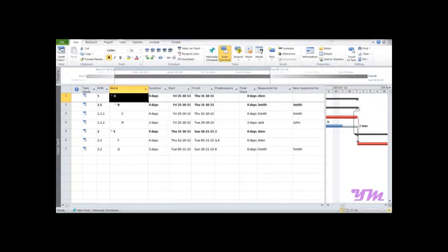Module 7, Recurring Activities. Say a specific activity repeats itself on a specific day of the month, day of the week, day of the year, or a specific time frame during the year. Then we need not enter that activity or task again and again. Instead, Microsoft Project 2010 has a feature named Recurring Task, in which we can enter the task which recurs and mention the interval of its repetition. So it would appear in our task list automatically, and we need not enter all the values manually.